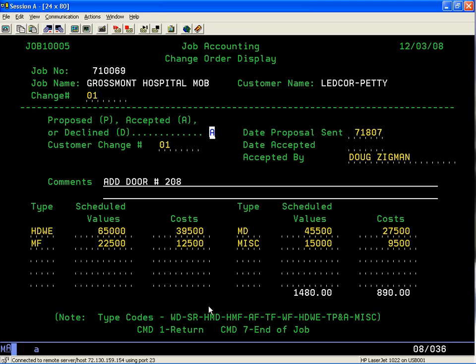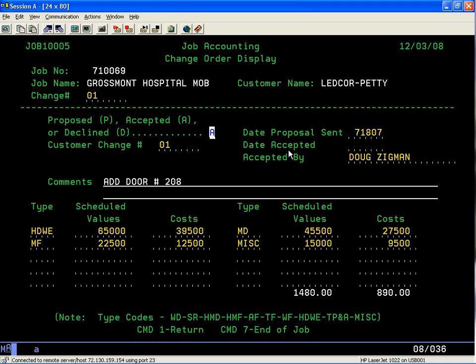We're going to see that there are some options—whether it's a proposed change order, whether it's been accepted or declined. You put in the status, the date of the proposal that you've sent, whether it was accepted and who accepted it, and the information about what caused this change order. You have two lines of text that you can put in.